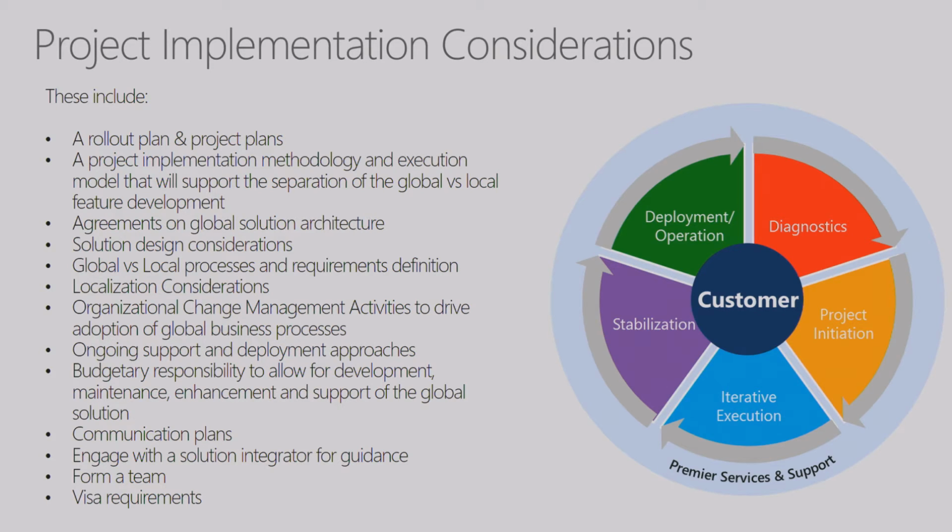So one of the things I want to point out here is support and deployment approaches. Because we are not just building it. Once you build it and deploy it, you need to support it. So think about support. You need to think about patching it and how to fix the issues, and you have to lay that foundation up front. You have to let them know if it's going to be an emergency fix, when you're going to be pushing it out. If it's not an emergency, what is your patching schedule, duration and things like that. All those things need to be figured out.